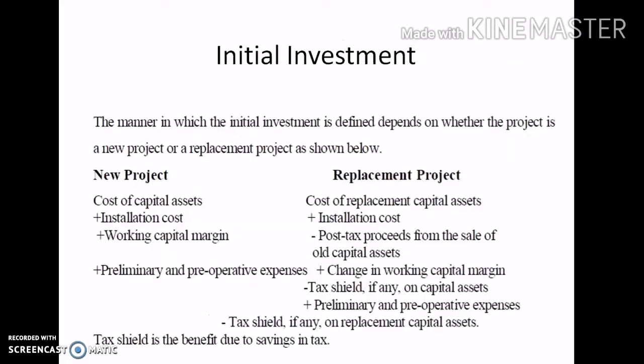The manner in which the initial investment is defined depends on whether the project is a new project or a replacement project. For a new project, the initial investment is calculated by adding the cost of capital asset, then installation cost, working capital margin, and preliminary and pre-operative expenses.